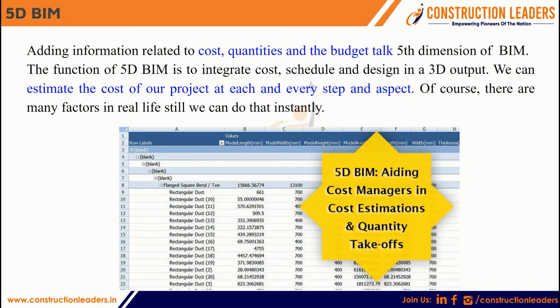Of course, there are many factors in real life. It's not a perfect 100% guarantee that whatever cost is included in the model, that much only we are going to have in our pockets. No, it's not like that. What about the transportation cost, and what about the temporary storage, any building constructions and all? Definitely some percentages we have to consider for the additional costs.